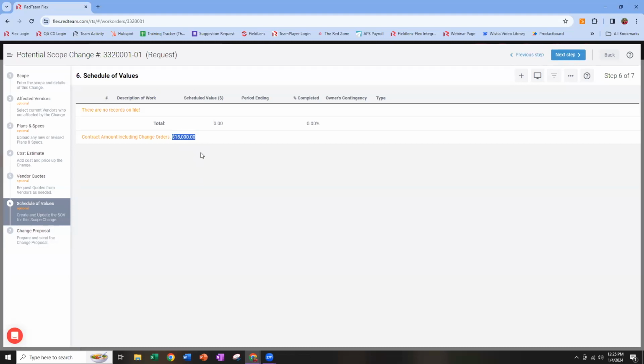So that being said, if you don't want to have multiple flooring line items on your customer bill, you might choose not to build anything here. But just know that there won't be any reminders after the fact. If you authorize the change, there's no built-in reminder process to tell you you need to go to the master SOV and add $15,000 to the flooring line item.